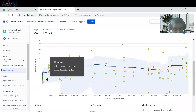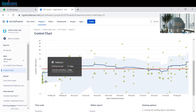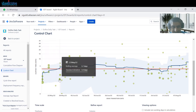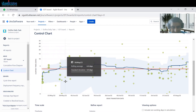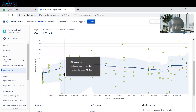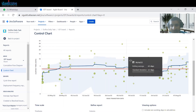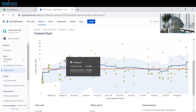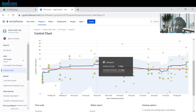You can see that in the month of May our standard deviation is around two to four days. Then it suddenly increased — maybe we added some tasks which are taking more time, or our team is now taking more time due to certain processes. But overall our standard deviation is quite consistent, so we can predict the future. With the same speed and same kind of tasks being created, we can predict how much time we are going to take.